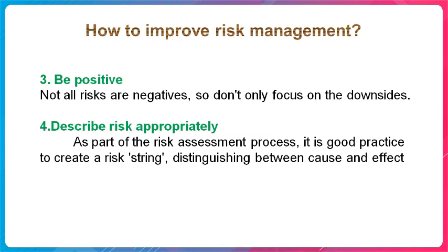Third, be positive. Not all risks are negative, so don't only focus on the downsides. Risk can be positive too, presenting opportunities and enabling us to take advantage of a given event or situation. Fourth, describe risk appropriately. As part of the risk assessment process, it is good practice to create a risk string to distinguish between cause and effect.